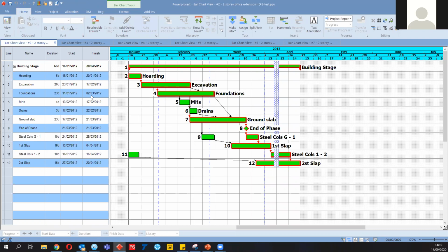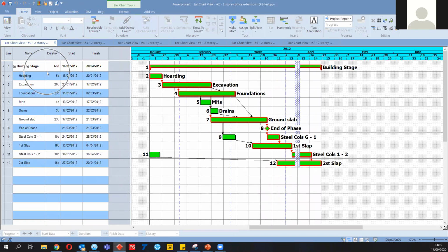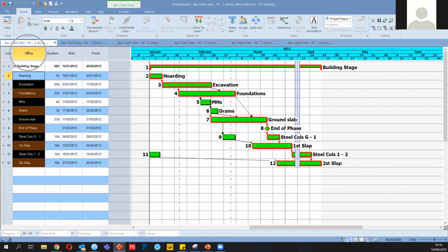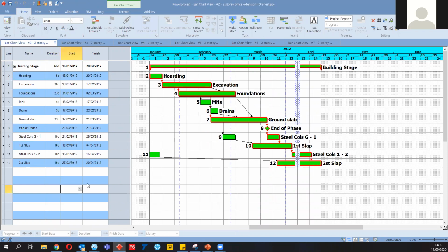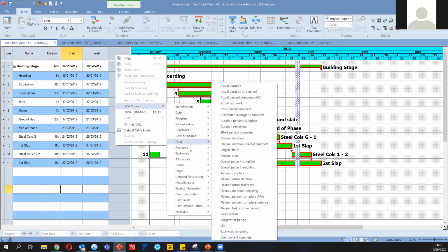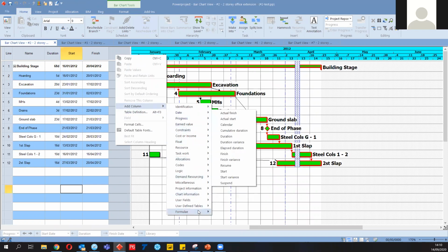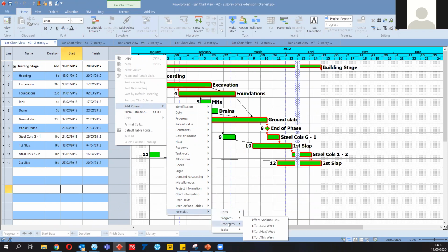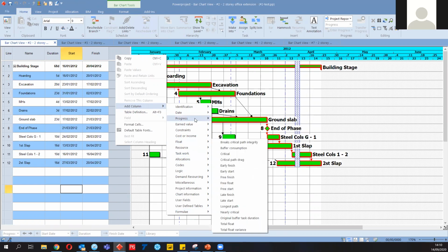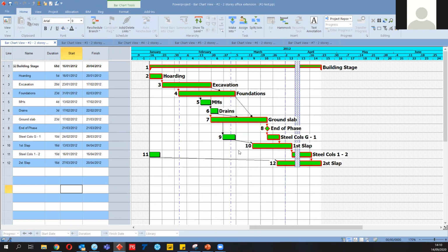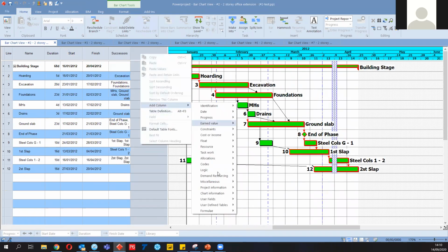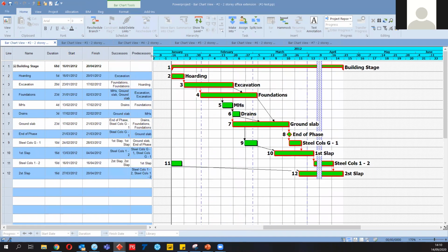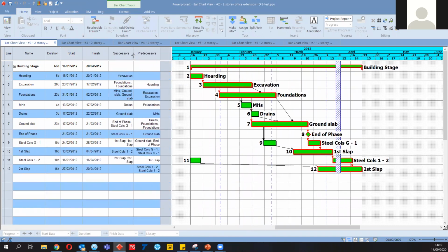It is a sample project, which we have as a spreadsheet. We can have the activities, names, duration, and start and finish days, where we can add almost every piece of information to our spreadsheet, and also we can write formulas to display percentages, resources, and efforts for specific time frames. And let's go to the logic: we can add a successor, we can add a predecessor, and we can add all this information into our spreadsheet.